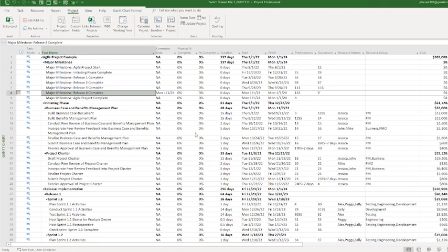So here you go. Microsoft Project, when you start making changes like that, is going to warn you. It says this will remove leveling delays. Changing the schedule from setting will remove leveling delay and leveling splits from tasks and assignments. So if you've done task leveling, like you leveled your resources, or if you did any kind of splits in your tasks, and you make an adjustment like this that's really big and major, Microsoft Project's going to warn you.